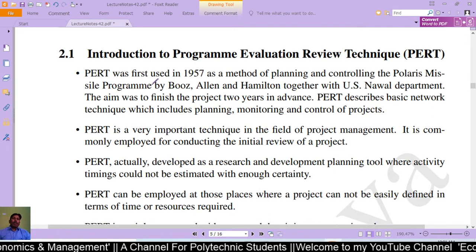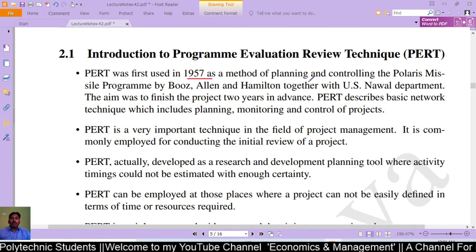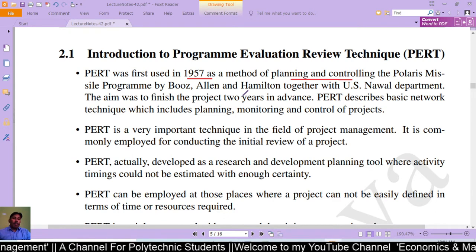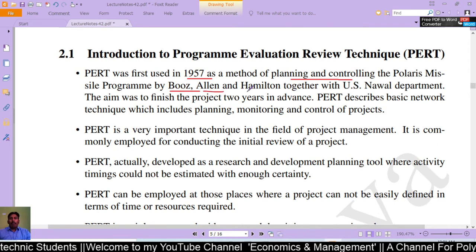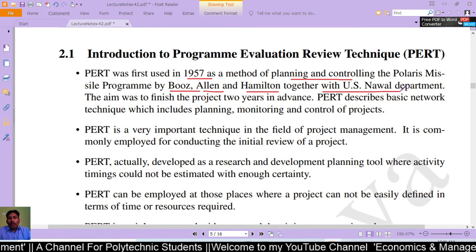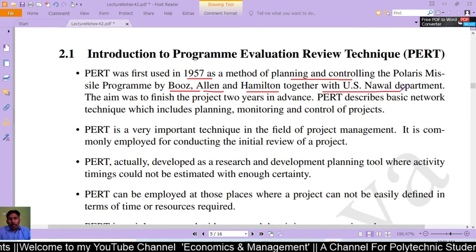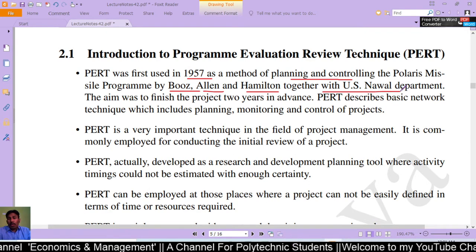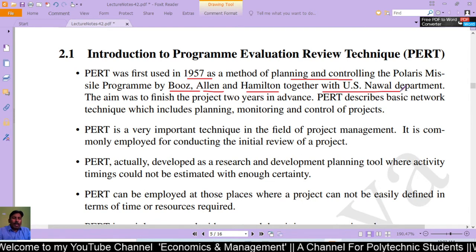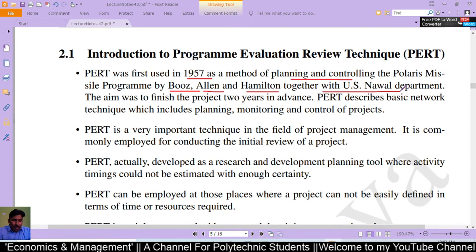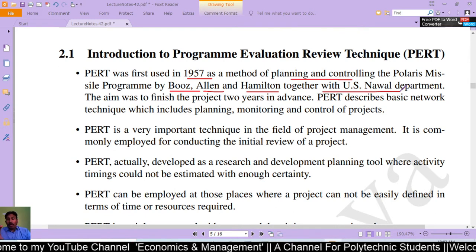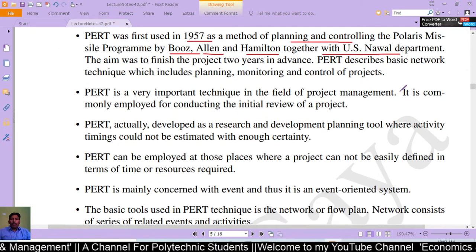PERT was first used in 1957 as a method of planning and controlling the Polaroid missile program by Booz, Allen and Hamilton together with the U.S. Navy Department. Together they first used PERT in 1957. The aim was to finish the project two years in advance, and it describes basic network techniques which include planning, monitoring, and control.